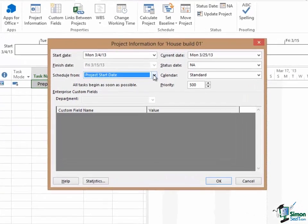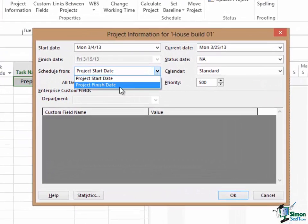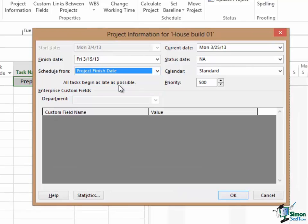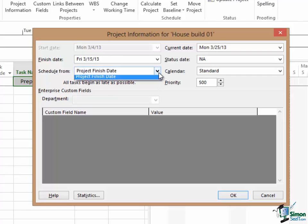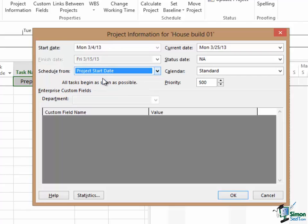If I chose project finish date, watch what happens. I now enter the finish date, not the start date, and project will tell me when I need to start. As it is with my project start date of March the 4th, project tells me that currently my project will finish on March 15th.